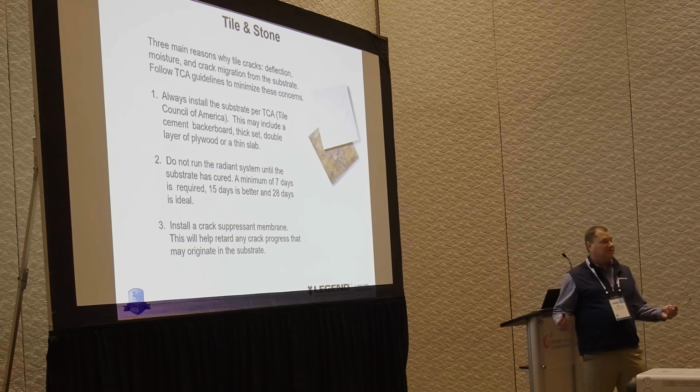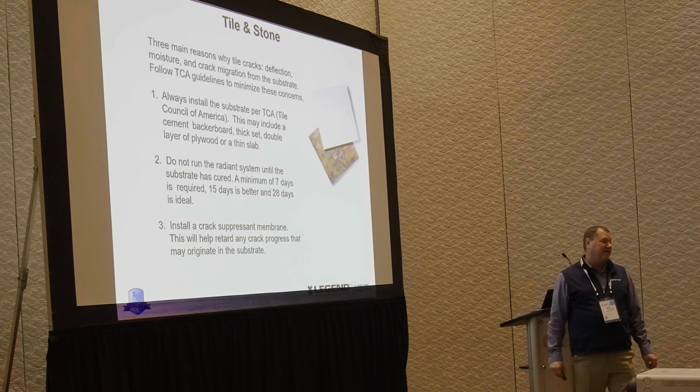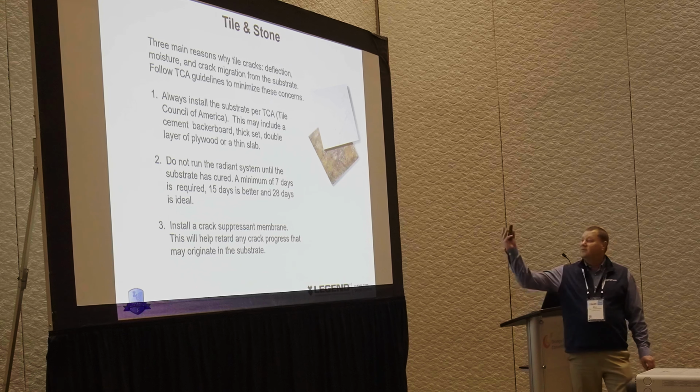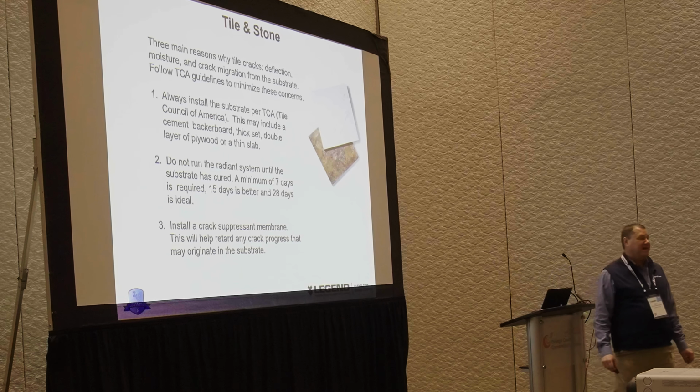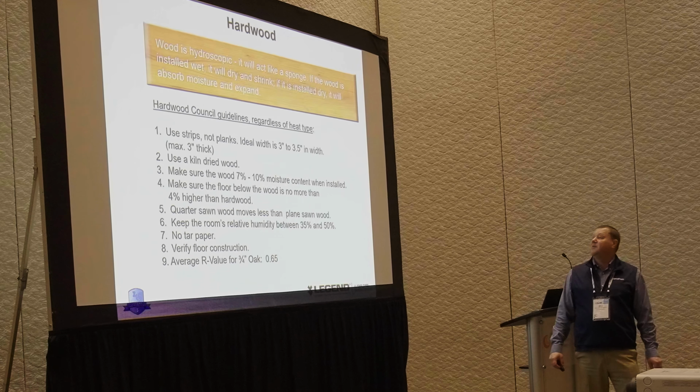Maybe not for the budget quote, because we don't know what it is. We're going to calculate an estimation there. But when you get to that final stage where you're getting ready to do some installs or you're getting ready to do some commissioning, find out if anything's changed from what we designed, making sure that we can accurately heat the way we thought we were going to.